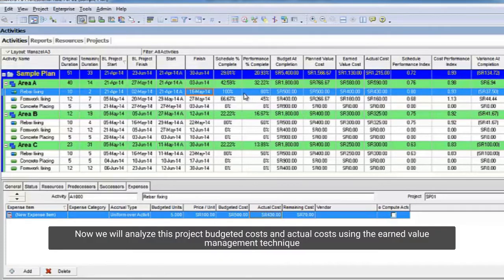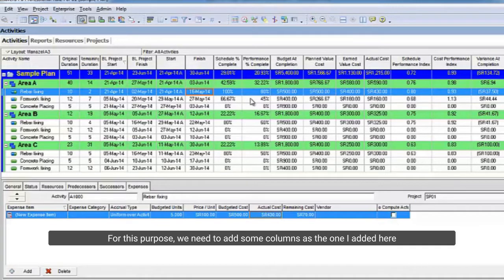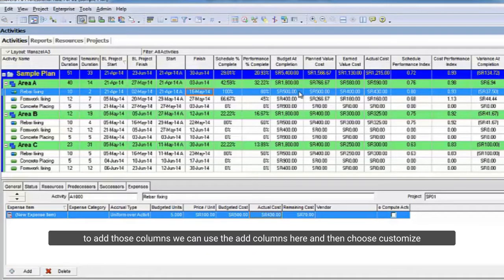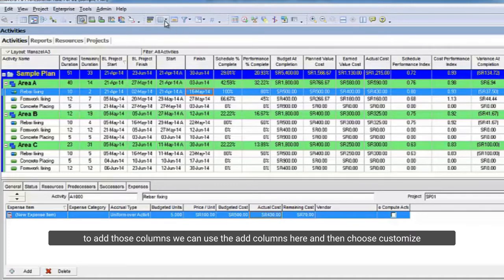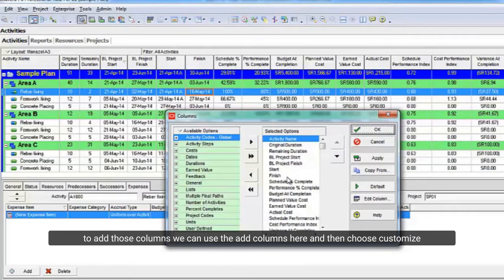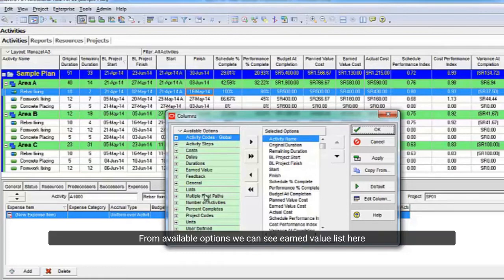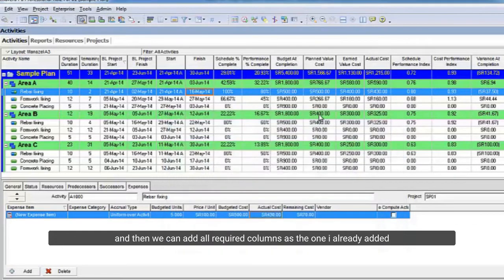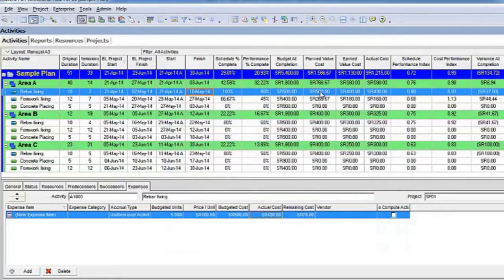Now we will analyze this project budgeted costs and actual costs using the earned value management technique. For this purpose, we need to add some columns as the one I added here. To add those columns, we can use the add columns here and then choose to customize. From available options we can see earned value list here, and then we can add all required columns as the one I already added.